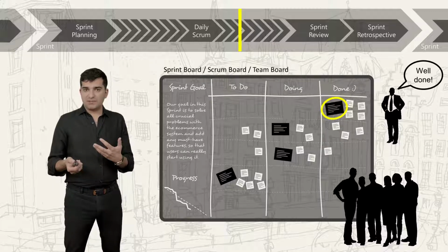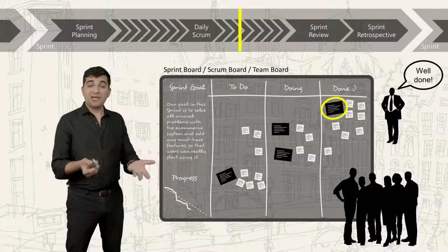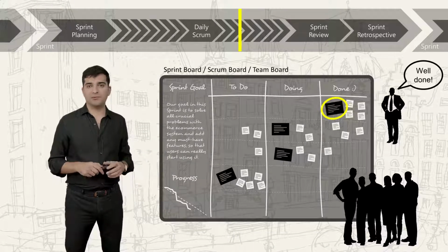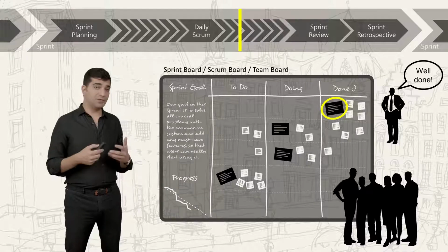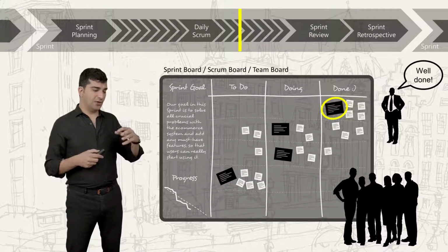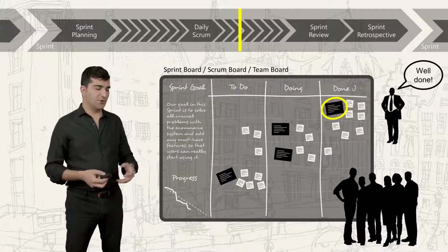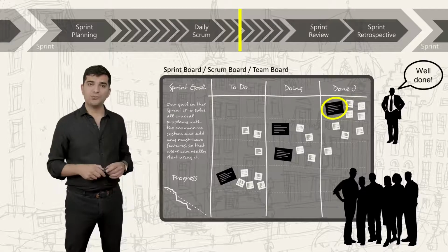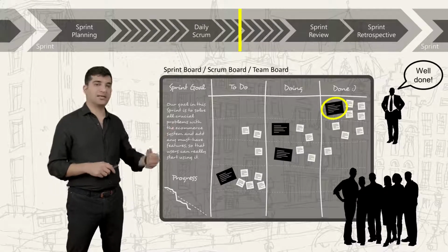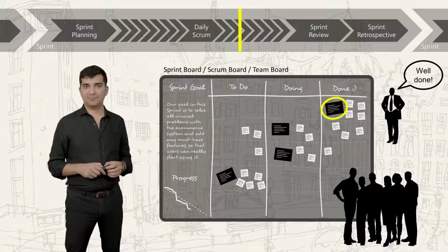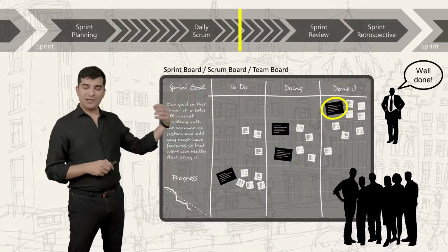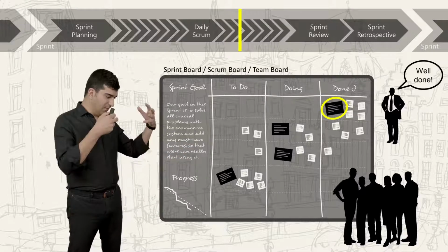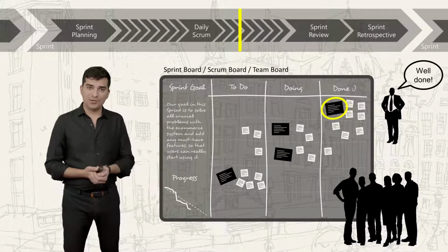What about other types of tests? What about documentation? For example, do you need to have some type of reference manual for the features? There are lots of things here. And therefore, it's a good idea to have a list of everything that we expect to do for each item before we call that item done, isn't it? Then when you go there and you talk to the developers, you know what done means for both of you, and you're thinking about the same thing when you're talking about done.